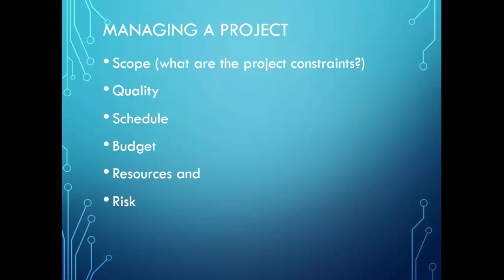Also, to finish the job, you need resources, and resources can be people, equipment, physical facilities, or supplies. Resources could be fixed or variable, and of course resources have the most impact on the schedule. You could have only one person doing the job and they might take 3 weeks, and you could have two people and it might take 2 weeks, but adding another person might affect the cost. So you need, as a project manager, to look at all factors, how they interact with each other, and make your own judgment based on that.